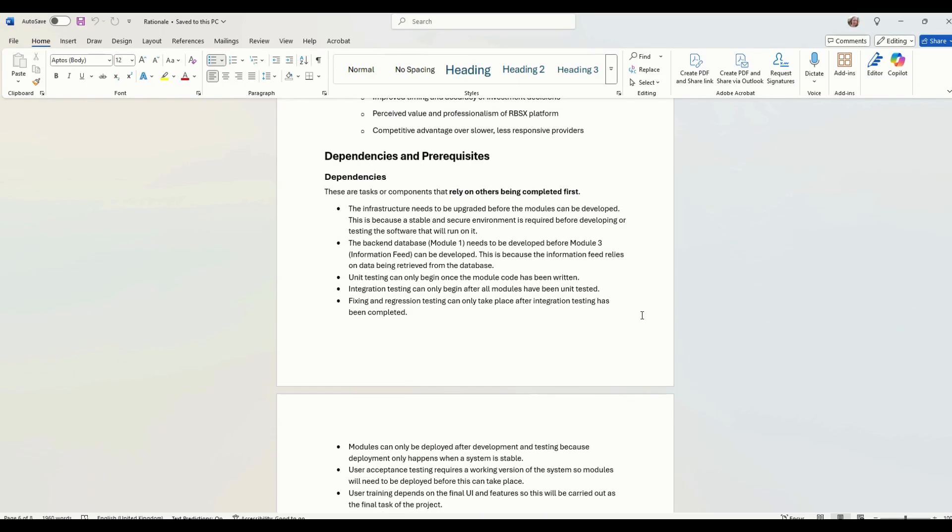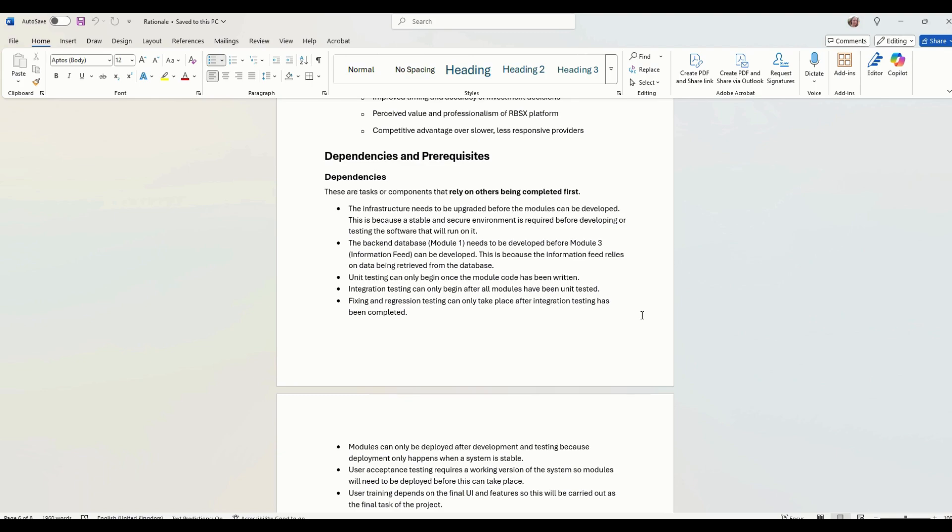Dependencies and requisites. Dependencies are tasks or components that rely on others to be completed first. So remember, earlier I spoke about the database. The database needs to be developed before the information feed can be developed, because the information feed relies on data being retrieved from the database.